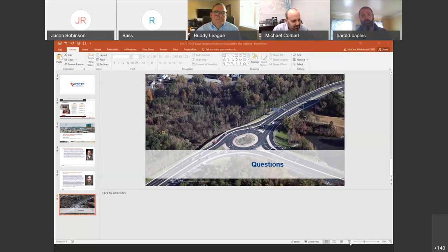Mike, I'll kick it to you first. That's a pretty tough one to answer, Harold. But holistically, I represent Branch, and we look at every project individually, trying to get a thorough understanding of the documents and the time frame of the project and the delivery time frames as well. Sometimes there's a compressed bid schedule, an aggressive bid schedule from our perspective as the contractor. Two weeks to bid a good sized job is just not enough time. I'll just lay that out there. If we've got some long lead time where we can get some thorough scope clarifications, that reduces the risk.